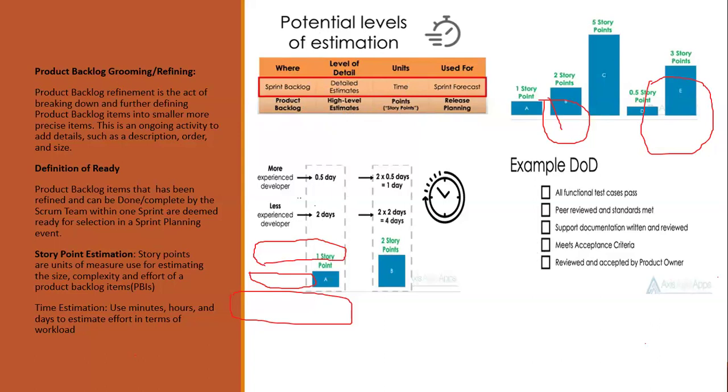When you are estimating a user story, the reason developers use story points is that you are not estimating the time or how many days it will take to deliver that task. Story point is not the same as time, because it considers three things: the risks involved in that user story, the complexity, meaning how difficult and the volume of work required, and the effort the whole development team will need.